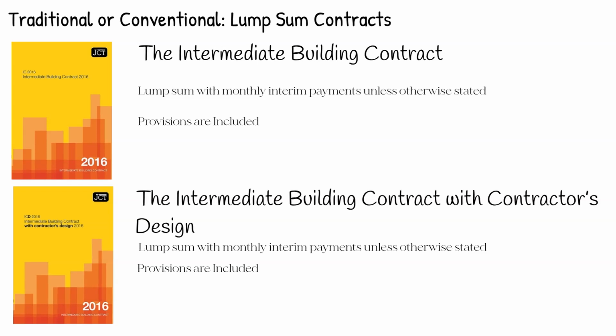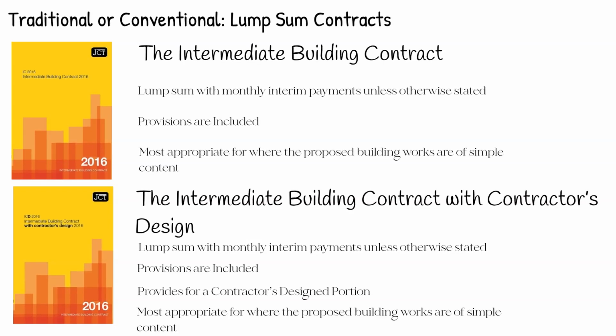The only difference between the two contracts is that the latter provides for contractor's designed portion. The contract is most appropriate for where the proposed building works are of simple content, involving the normal, recognized basic trades and skills of the industry.